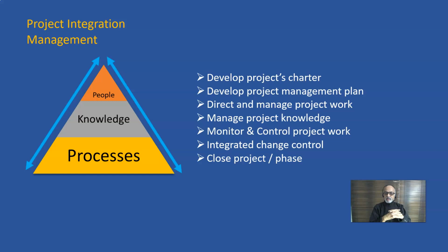Then the project management plan. When I say project management plan, here it is the integrated project management plan. All others are owning plans for their scope of work. Quality department has a quality plan, risk management has a risk management plan, and each subcontractor will have a subcontractor plan. Then as a project manager, you should have the integrated project plan from start to end, and one should maintain it. And in bottom-up integration, the individual independent stakeholder-level plans must be integrated into this integrated project plan. That is a continuous activity.